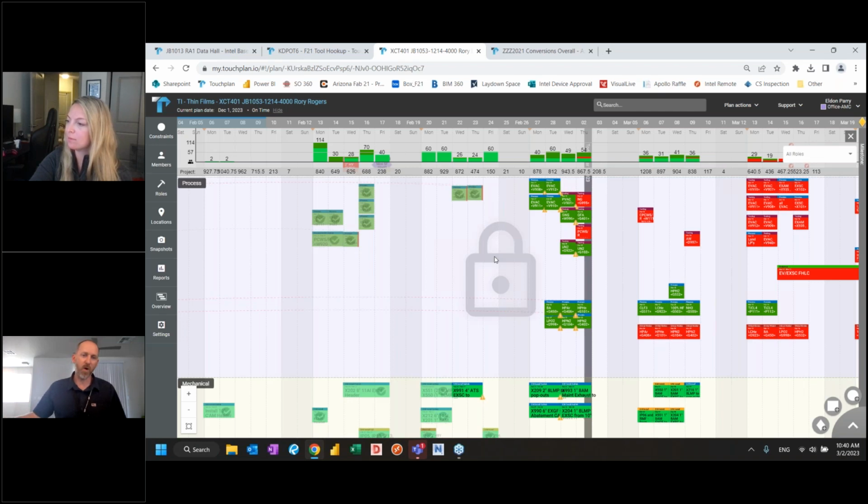My strategy is I hold the office responsible for ensuring that data collection points are executed, and I hold the field responsible for ensuring the information about installation is executed. So frankly, if I find things not status here, I don't go to the foreman and general foreman. I go to my project engineering or my project management staff, and I say, hey, what's going on here? Why don't we have status updates? Why isn't this pinned? Why aren't the variance reasons explained? We do have some general foremen who enjoy that information, but that's a person-to-person thing.